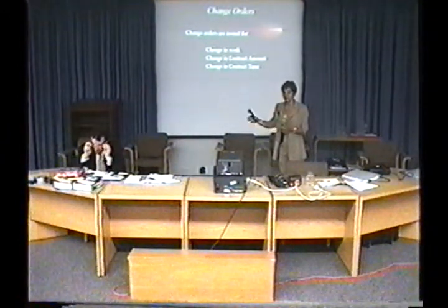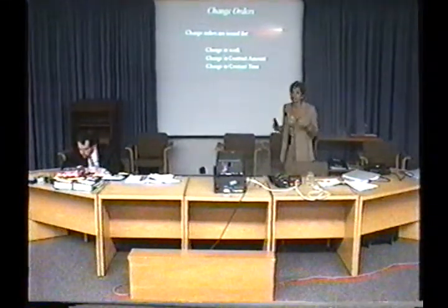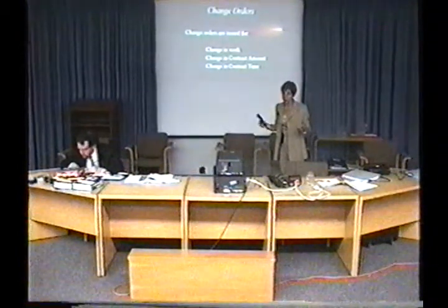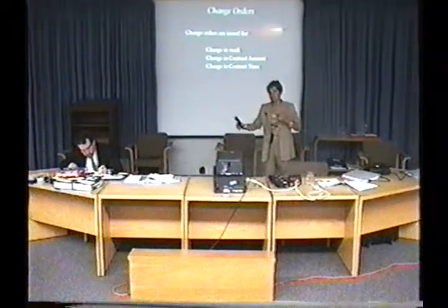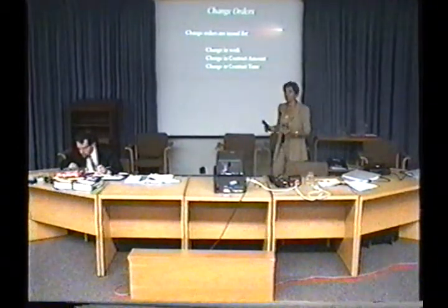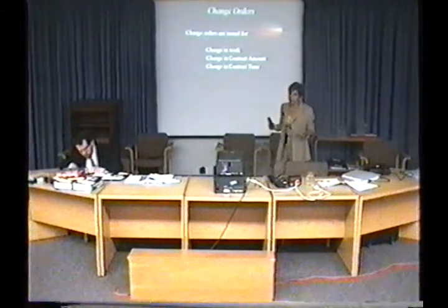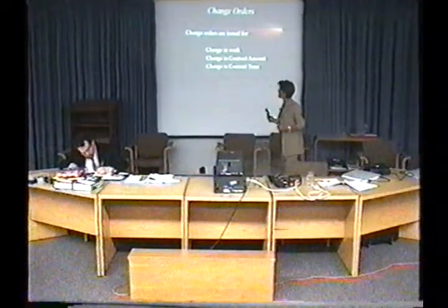On the other hand, the consultant is there to make sure that the prices submitted by the contractor through any change order are appropriate. So when these change orders get issued, the consultant may not approve them, or the prices exceed what they should be, and these issues become quite common in disputes as well.